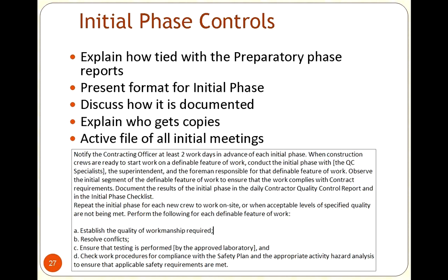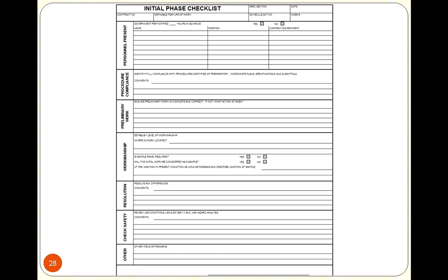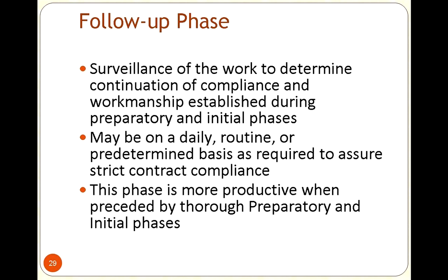But essentially what we were trying to do is just make sure that there were no conflicts on either side. Again, it was trying to make sure no bad blood was coming out, that if we're preparing and now we've got the installation phase going on, that we've got a good understanding of what's happening with each other. So again, we want to know who was there. Was there any prep work that needed to be done? Was there a good quality of workmanship? Was there any issues that got resolved that day that we needed to document? And again, safety first, safety first, safety first.